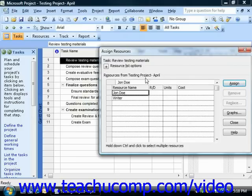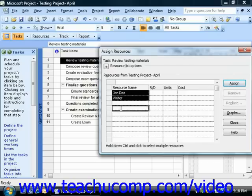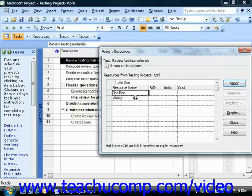Next, select the name of the work resource that you wish to assign to the selected task from the list shown. If you would like to select multiple resources at the same time, you can click on the first one to select it, and then hold down the Ctrl key on your keyboard and click on the other assignments that you would like to make within this dialog box. You can then click the Assign button once you've selected the resource or resources to assign to this selected task.